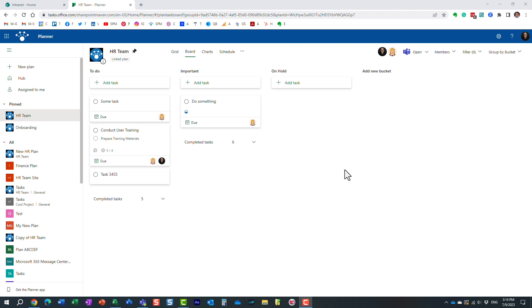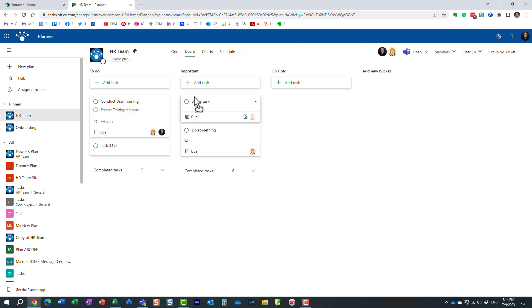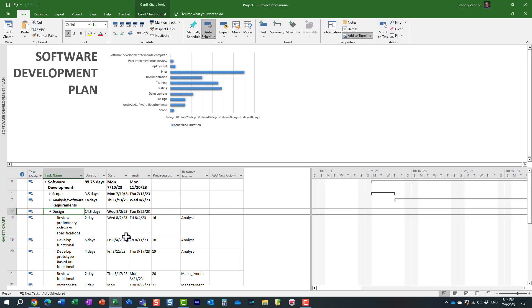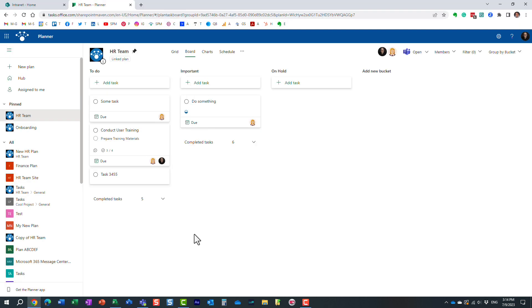But, unfortunately, this Planner application is kind of lightweight in terms of capabilities. You cannot manage resources. You cannot manage task dependencies. Essentially, you can create tasks and organize them into those different buckets. And that's about it. You cannot say this task has to be completed prior to this one or something like that. But something we can actually do with Microsoft Project. So we have these two different applications. One is extremely complicated and it allows you to do anything you want. But we also have this lightweight application, which is a web-based application. But it lacks some of the capabilities we have with Microsoft Project.